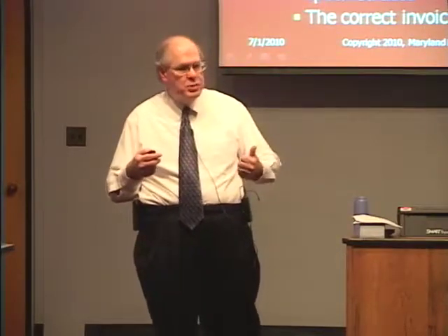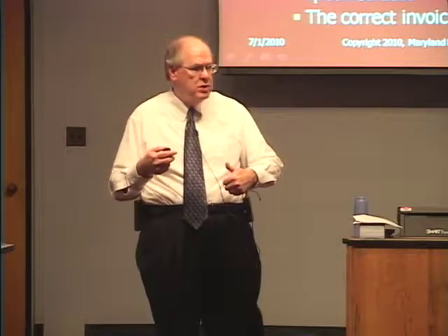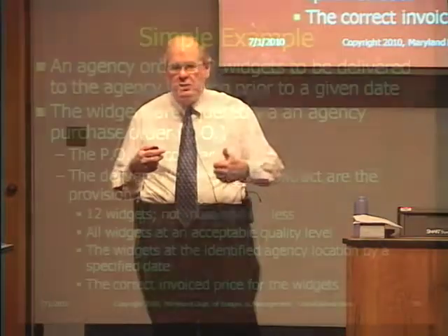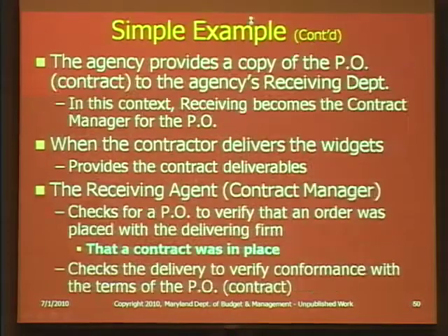And the other thing, you want to make sure that the price that is charged by the vendor on the invoice is the same as they quoted when you got a quote from them, that they're not charging something different even if everything else is as ordered. So those are the elements we're looking at in contract management here.